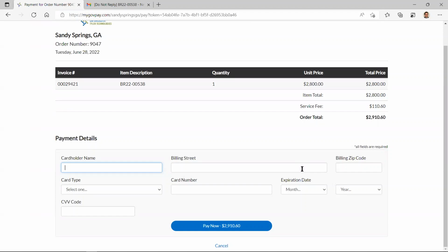One thing to note is you do have to pay before we begin the plan review process. All right. We've kind of gotten burned in the past where people maybe didn't pay, then they changed their mind. And it gets very expensive when you're doing like 4, 5, 6, 7 reviews. It's a lot of time because at any given time, we have a team of probably in the neighborhood of 5 to 6 people reviewing your drawings. It's an hour or so each time, times 7, it adds up. But anyway, just go ahead and fill out that information and you're good to go.